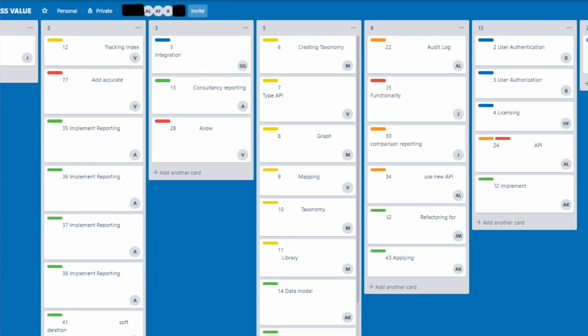And at this point, obviously, you probably call it an end to the discussion, and you start addressing any anomalies or any challenges that people have, so that you can settle on a business value in the first instance for each of the features, and then close and seal this board, and then rinse and repeat. Open this up for the next value for time criticality and repeat the exercise. Having completed this, afterwards you can assign the numbering, and then you've got some values to be able to calculate your WSJF.